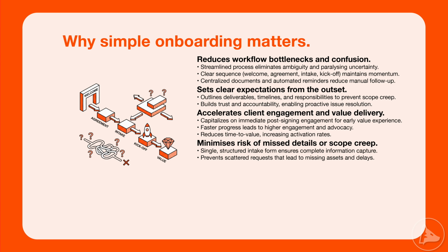Minimizes missed details and scope creep. Most onboarding problems come from drip-fed information. You ask for one thing, then another, and suddenly it's a month later and you still don't have the credentials, brand assets, or stakeholder list. A single structured intake form and checklist solves that.